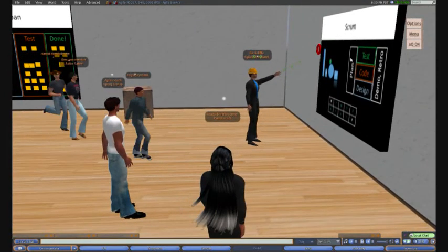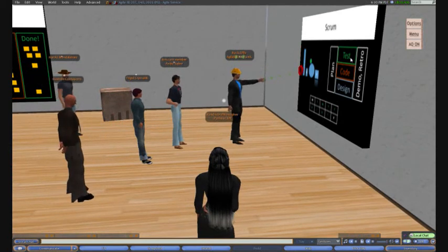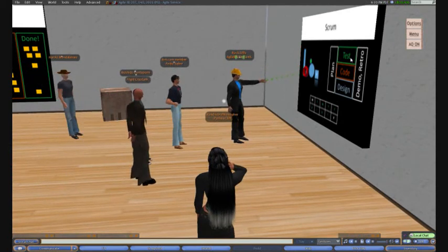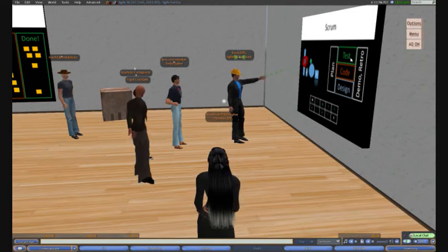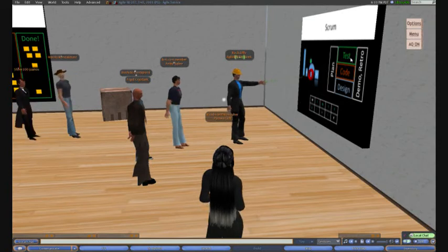We have our product backlog sorted by business value. We select some for our iteration. We rock and roll on that for 2 weeks. Every day we have that 15-minute Scrum meeting. Say, what do we do? At the end, we have a demo to our customers, and we get feedback. We rely on that feedback from the customer that says, oh, you didn't understand the requirement.